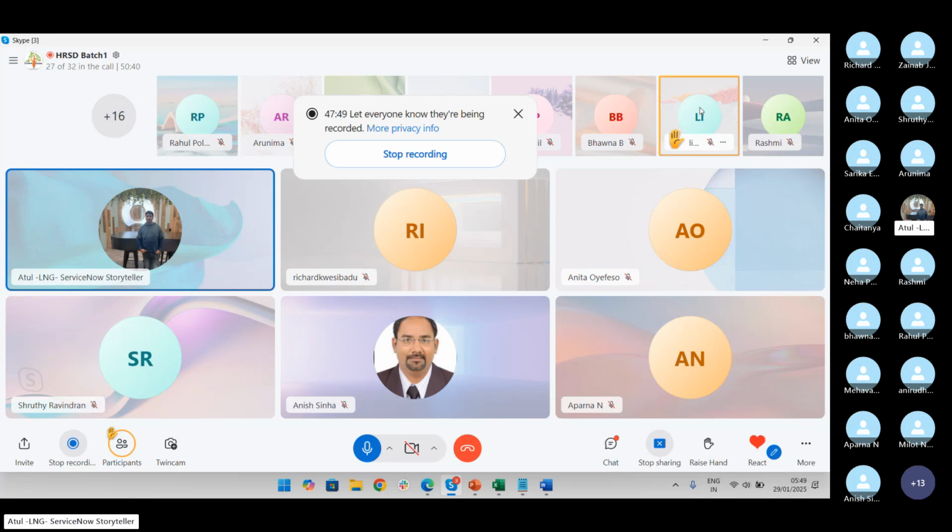Second, close the topic then and there. Third, reach out to these stakeholders separately on the same day or the next day and understand the logic behind their view, why they are saying yes or no. And then prepare facts and figures and show them. Then you can get an agreement with everybody.